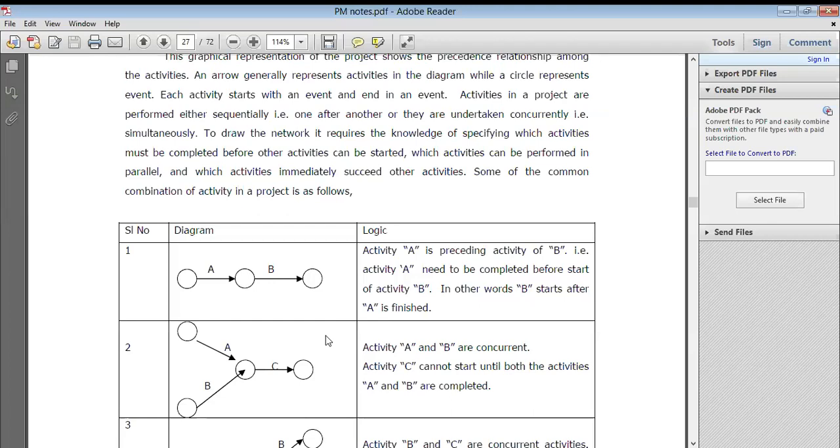Because they are dependent tasks, if A is not completed, B does not start; if A and B are not completed, C does not start. Sometimes work depends on C and E also, because F cannot finish its task until C and E are done.